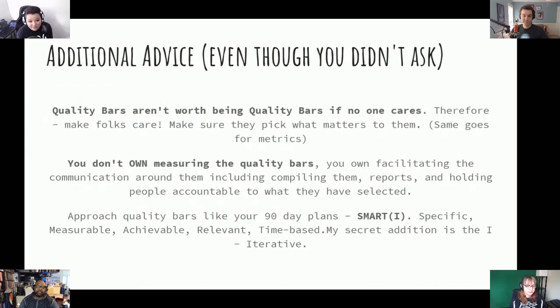And I was going to say also, consider building these things in. If you see a storyboard and you see the goals of the application, they look really cool. I highly recommend adding a goal named accessibility, a goal named quality, a goal named performance, a goal named security, so that it's built in and it's scored for the amount of effort and capacity it's going to take to build an application that meets the quality bars of your organization, that meets the needs of your clients or your customers, that takes care of all those things, so that it's not something that is extra.